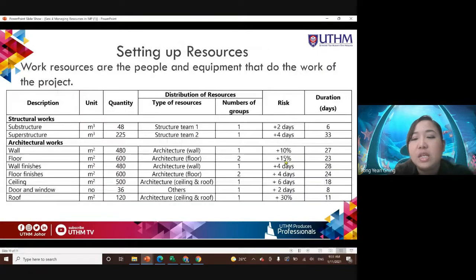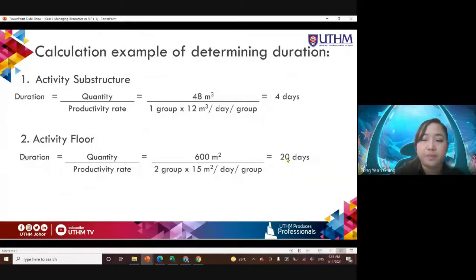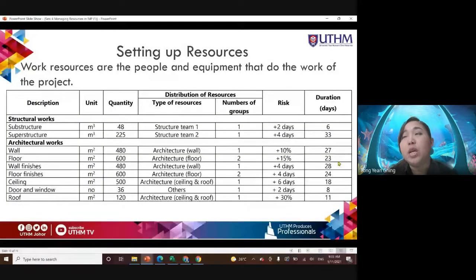So 20 days plus another 15%, that means 1.15 times 20, which gives 23. For example, if you calculate and get 23.2, do not round down to 23 because we have exceeded it. Once it is over, whether 23.1 or 23.2, we round up to 24 days.